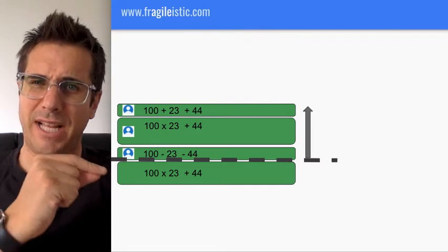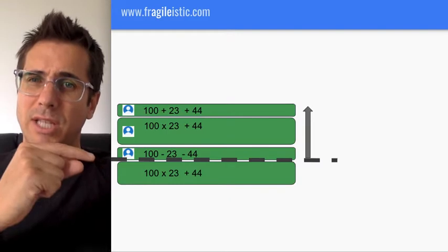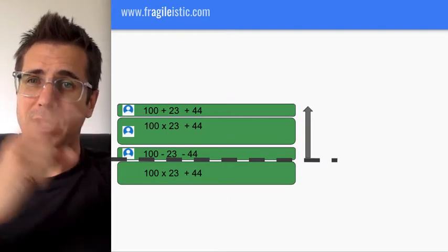Now, I've left this one at the bottom here. Make sure you've got the last one as well sized, because if one of these gets blocked, you don't want to have to do another meeting. You can say, well, let's just pick the next thing off the backlog. So that's what you'll do.